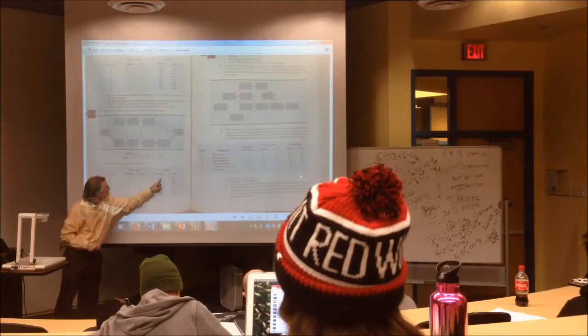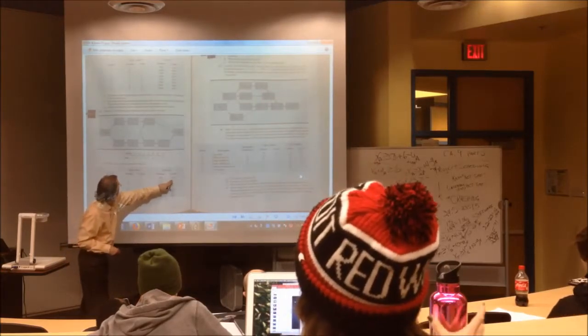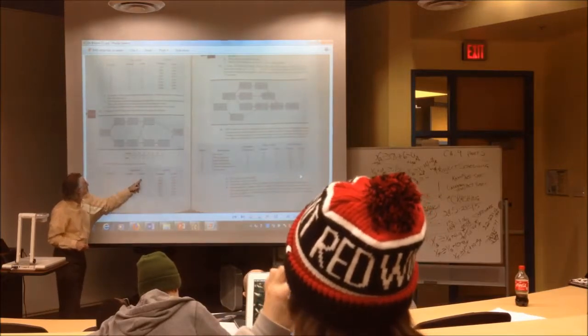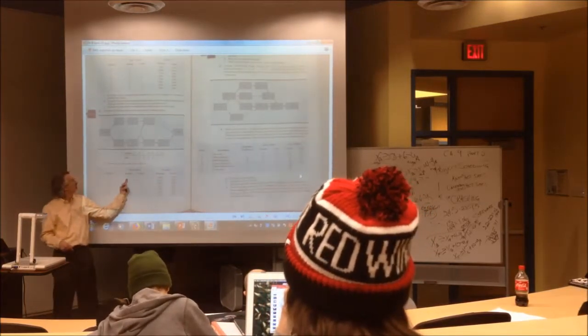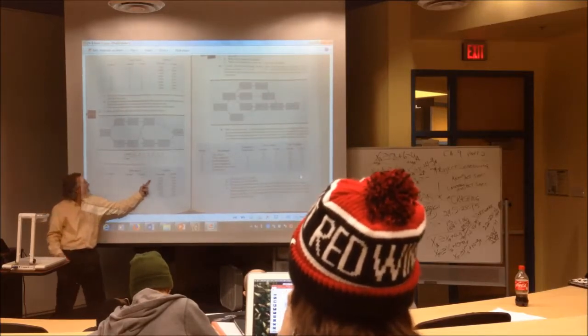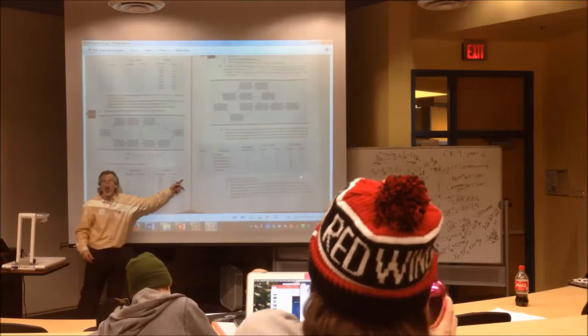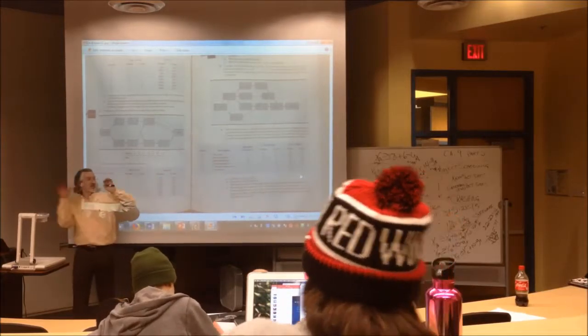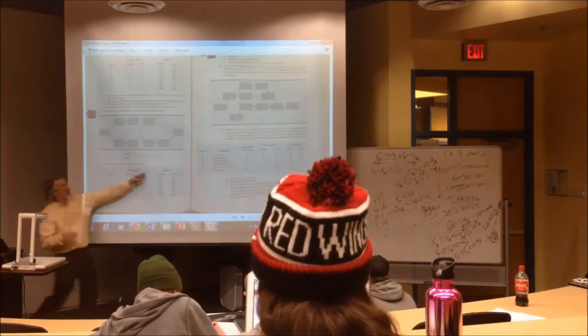It's giving you a lower cost, a higher cost. I can barely see that. I think that's 800 and 1400. This looks like a 3 to 2. So if we were doing our formula in 2 columns, it could be crashed about 1 unit at a time, and it looks like it will cost about $600 per 1 unit at a time. So our objective function, y sub a, would have 600. You get it? These are all the same.